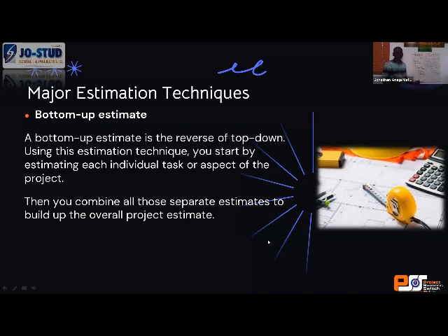Just put the damp-proof membrane, the black leather that we put on the foundation to prevent rising damp. You cost that. Let's say you are going to spend 20K. Then how much will you spend to cast your German floor? Let's say 100K. So the bottom-up estimating technique says that you add up all the individual tasks, costs, and time.